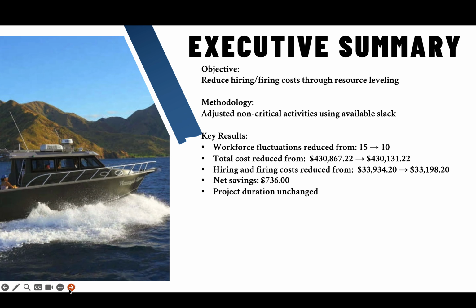Our primary objective was to reduce hiring and firing costs by improving resource utilization. To achieve this, we analyzed the project schedule, identified slack in non-critical tasks, and strategically altered those activities.